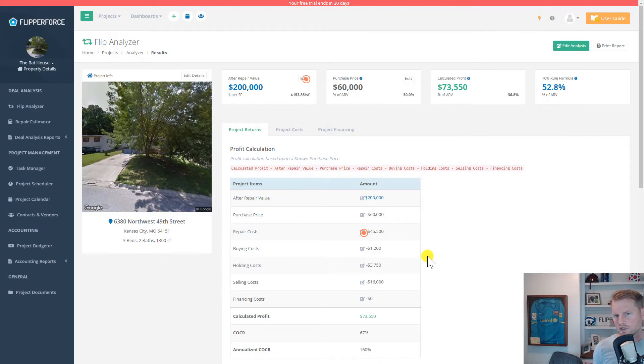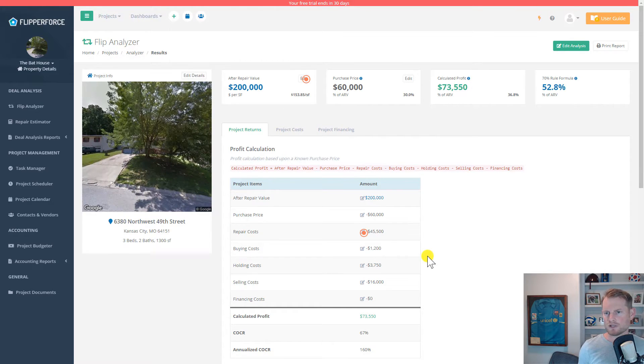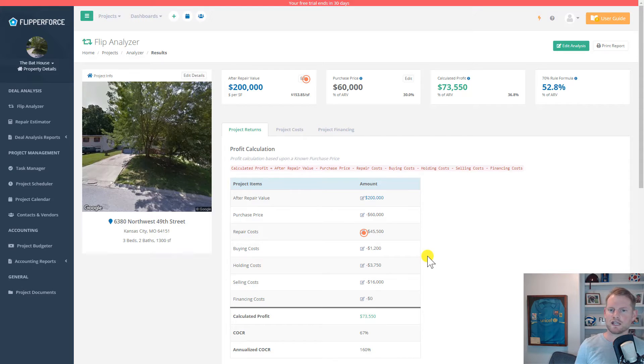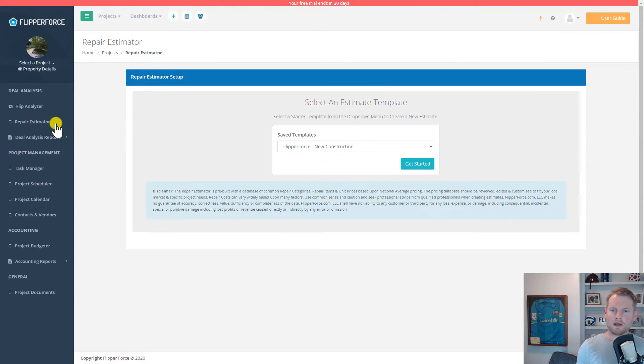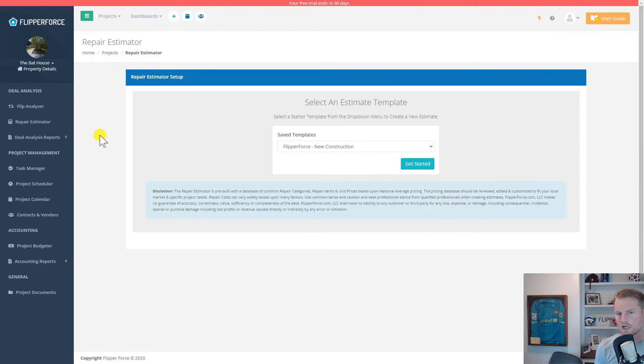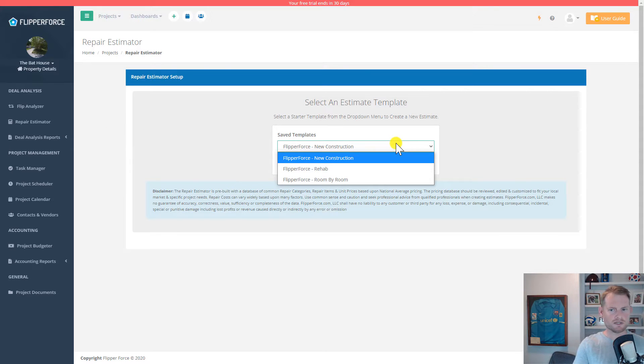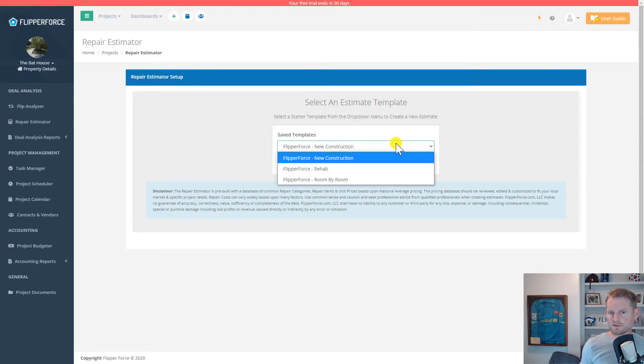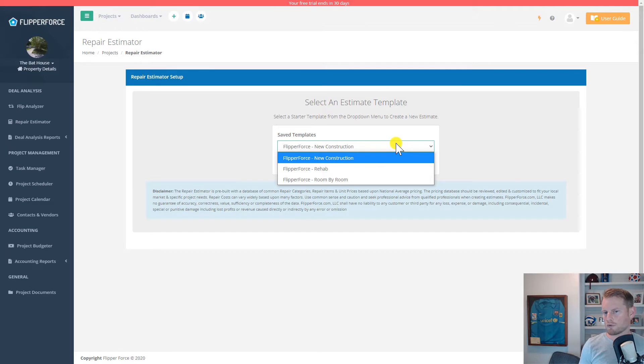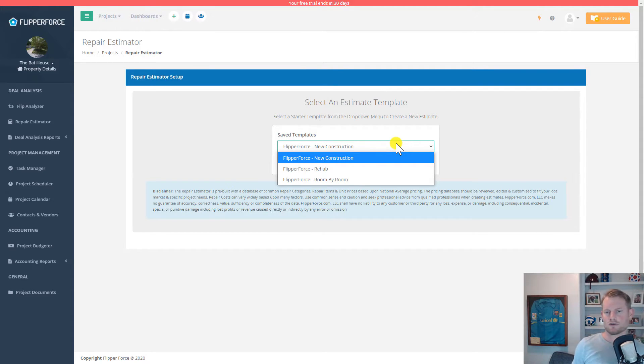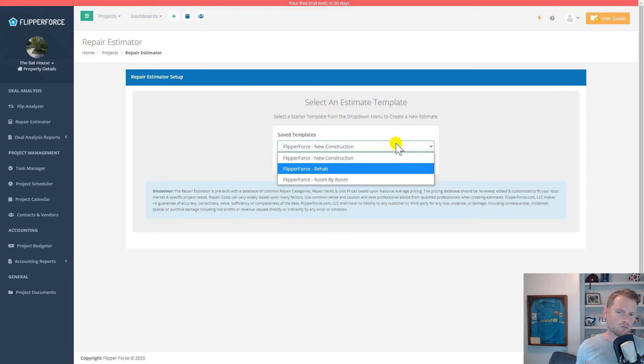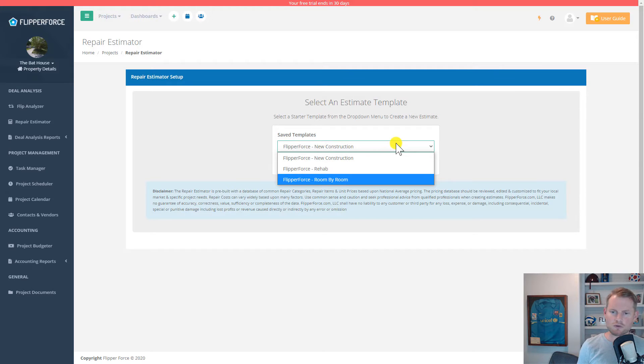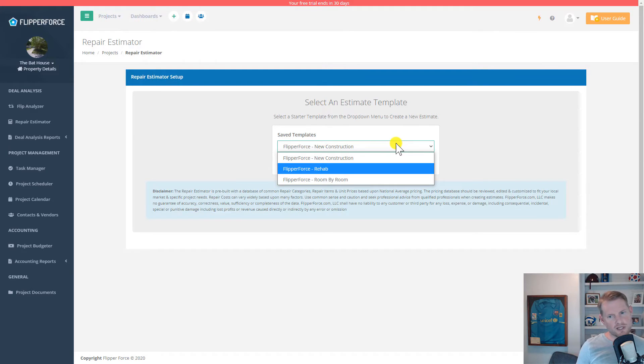Initially, you can use the flip analyzer tool to quickly analyze the viability of the deal. Then if you do think you have a good deal on your hands, you can spend a little more time putting together a detailed scope of work to establish an accurate renovation estimate for the project. Our repair estimator tool comes prebuilt with multiple estimate databases for rehabs and new construction projects that are built with hundreds of common repair items and unit prices that you can use as a starting point to help you put together an accurate budget for your renovations. Simply load an estimate starter template. We've got three different starter templates: a rehab template organized by categories, a rehab template organized by the different rooms on the property, and a new construction template.